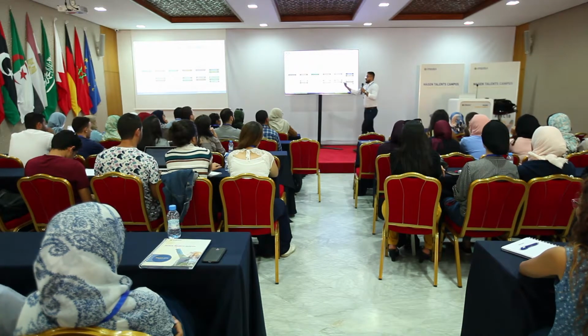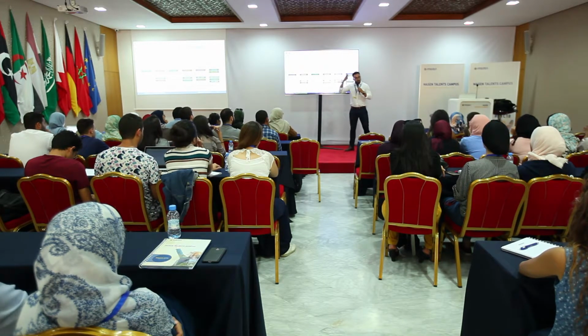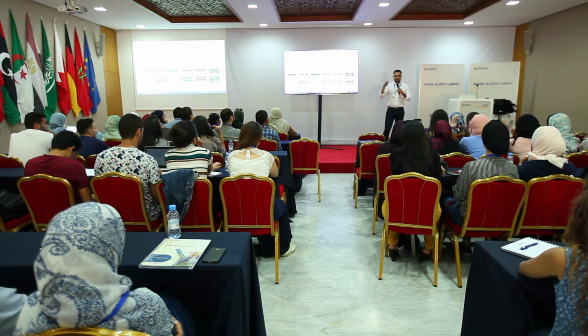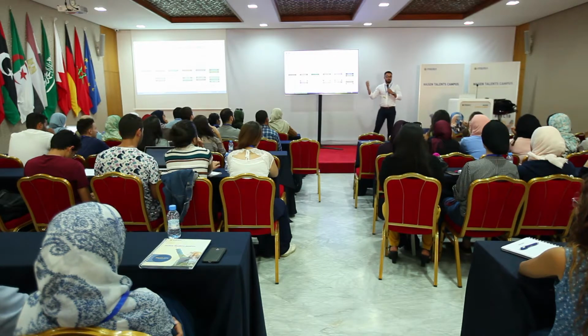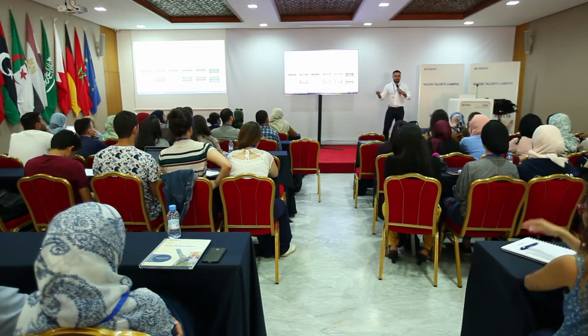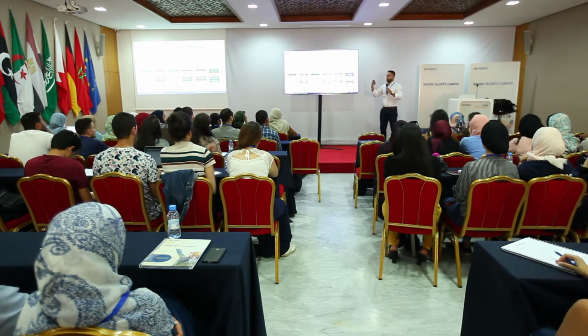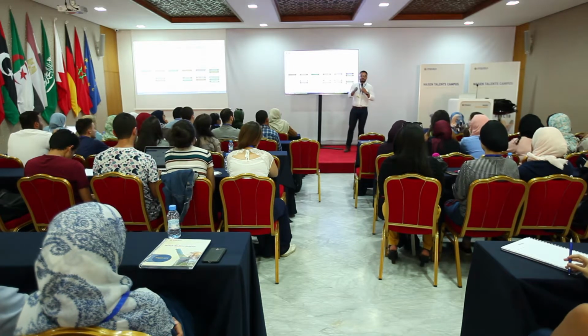How does the type of technology influence the duration of building a CSP station? It's true. Of course, the more mature the technology is, the shorter the time you will need to build it, because we know how others did it in the past. So it's just experience. Because troughs have been built for many years, today they take a shorter time to build than tower technology, but because of experience.